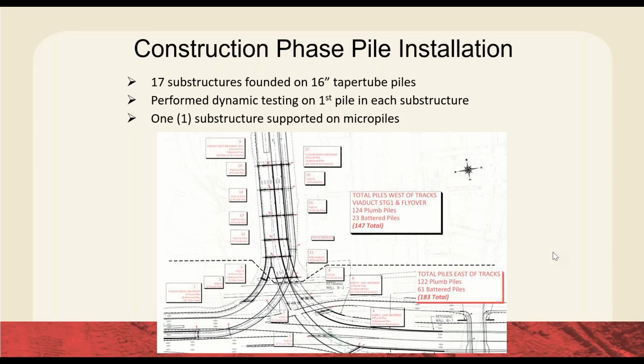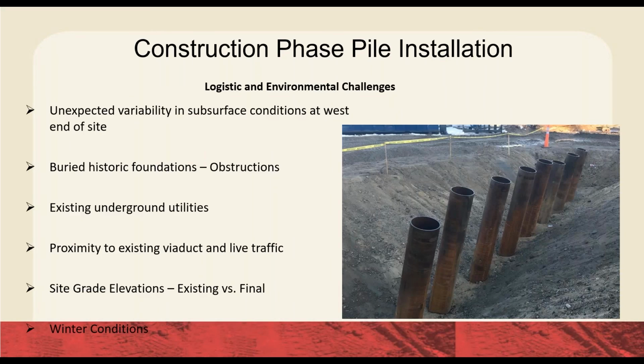And so the key here is that with the increased testing, with the commitment by the design team and the design builder to really do this testing up front, we were able to take a job where they were assuming about a month worth of construction per pier, and they were driving out piers in 2.5 to 3 days. And so it became an obvious and clear savings both in time and money for the client.